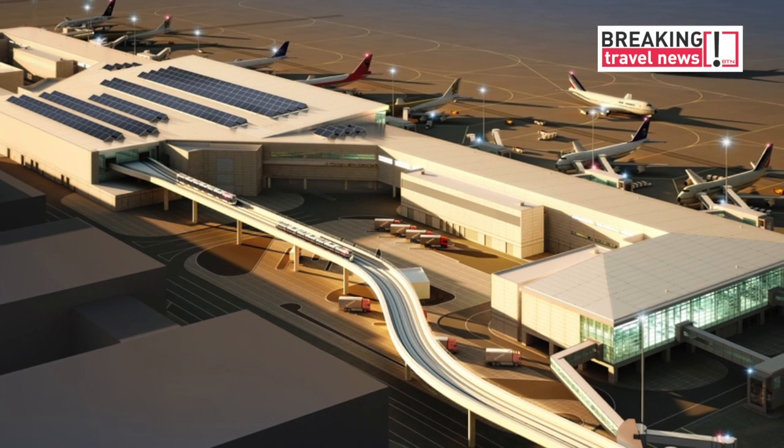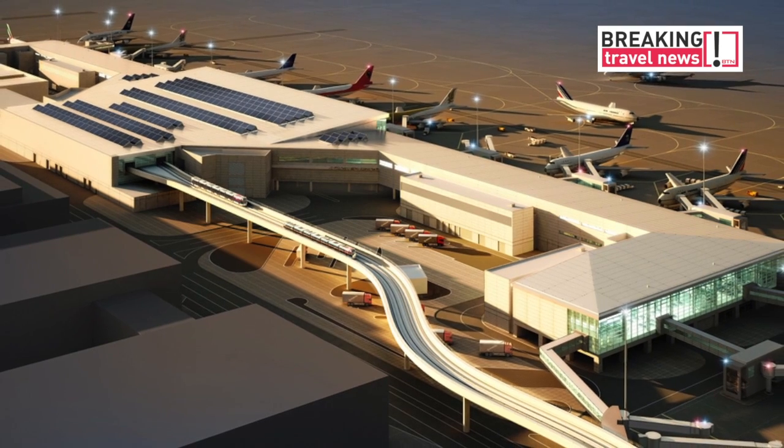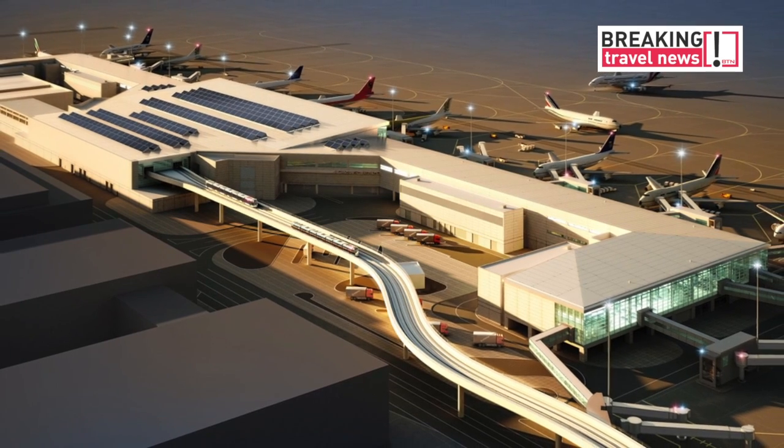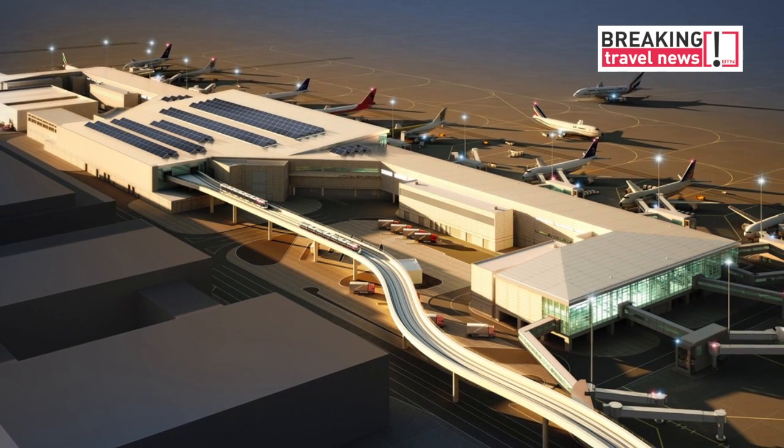And you can see the construction for the tracks well in progress at the moment. Absolutely. That's right. It's construction completion we're hoping towards the end of 2014. Then there'll be our normal, very thorough testing and commissioning process, and we're hoping to open for passengers during Q1 2015. So with Concourse D up and running in place, what will be the capacity for Dubai International Airport?